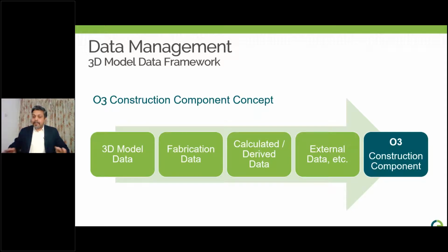Construction component is discipline specific. It can contain one or many 3D objects. The same 3D model objects could be used in different work packaging scopes. So we allow the user to use the same 3D object to create a construction component in different work packaging scopes. For example, a 3D object used for the fabrication work package scope can later be used for the erection work packaging scope in different combination. Maybe at a later stage, it can be used for the test work packaging scope. For sure, construction components for these different scopes will have different relevant data sets and graphical grouping.